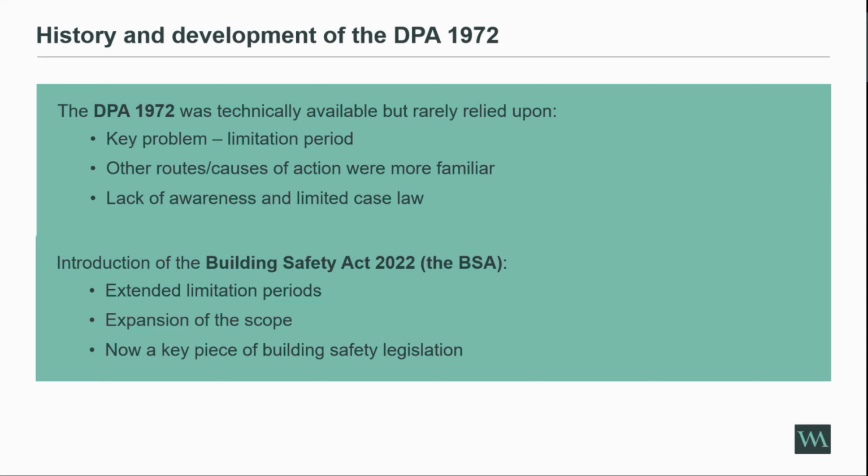However, obviously the Building Safety Act came in 2022, and this has changed everything in lots of ways. But it has basically transformed the DPA from this underused statute into probably one of the most powerful tools in building safety litigation. And this is particularly crucial for your historic developments. It's now opened the door for new claims that were once time barred. So you could say the DPA has had a bit of a new lease of life.